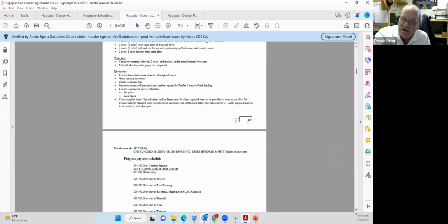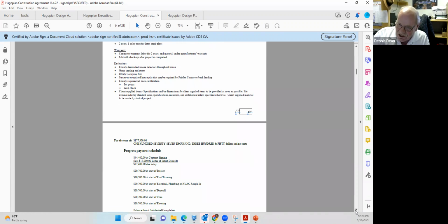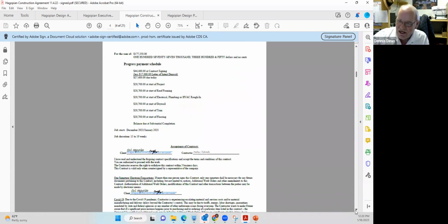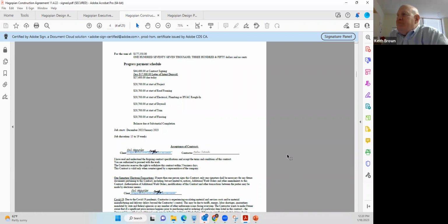Thank you, Denny. And on this contract that you're looking at, for example, where it states 7/16 thick plywood, all that kind of stuff, Andrew wants all that removed from the contract. He doesn't want to specify 2x4 studding or 2x6 studding. He just wants it to say studding the wall per the drawings. To finish answering your question, right now we're not taking it out of Denny's RFP, but it's in the works so that the RFPs would become the contract. That's what I thought. Okay, good, thank you.